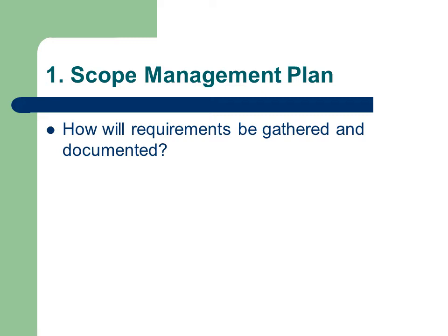The second important component of the scope management plan is a description of the procedures you will use to document and obtain approval for any changes to scope. This is called the change control process. We will discuss this in more detail a little later. Finally, you should plan how to review the success of scope management for the project and how to incorporate this into the post-implementation review.